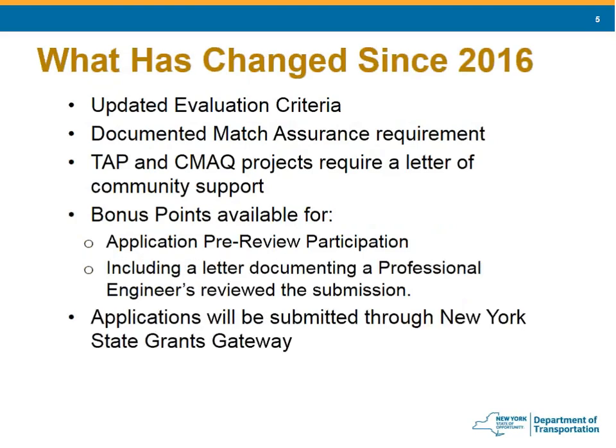Based on feedback from the last solicitation, the criteria have been revised and streamlined. We're looking for match assurance documentation — that means a letter of intent or resolution. We found in the past that sometimes after a project goes along, we don't have the support of the community. We know legislative bodies change, so it's very important that we get some kind of assurance from a mayor, county executive, or legislative board that they are on board with this program.